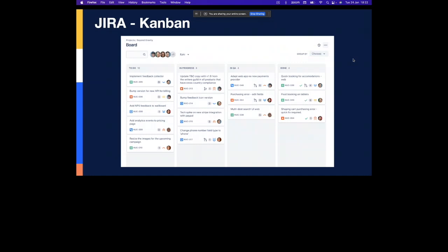So this is how a Kanban board would look. You have To Do, In Progress, and you have all these limits. The limits make sure you will not be able to pull another one here if the set limit is 4. It'll also indicate if something is stuck, so you have to get together with everyone to see if there's a blocker, resolve it, and move forward. It's very fast, coming with lean. So Kanban can be used for service desks and very matured agile teams in delivering.